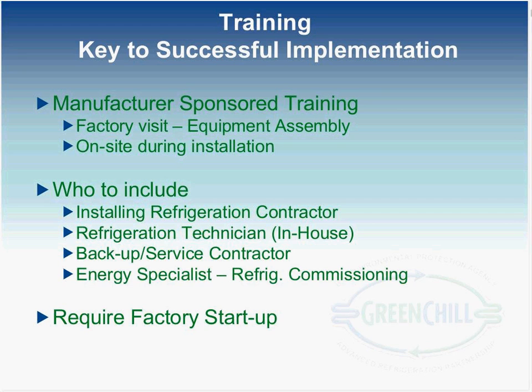We also have what we call energy specialists that do all the refrigeration commissioning throughout our organization. So it's important for a group of specialists to be involved in all the training, as they will be doing the final commissioning of the system from a refrigeration functionality perspective, as well as making sure that we're capturing all the energy savings that we can, as Scott mentioned earlier, the 2 to 3% energy reduction.